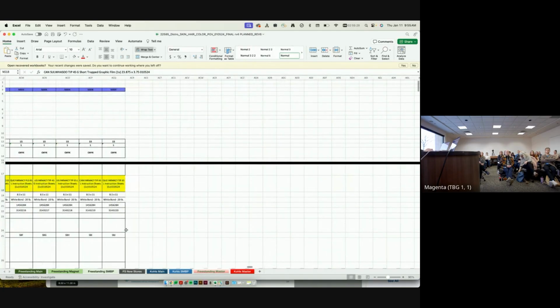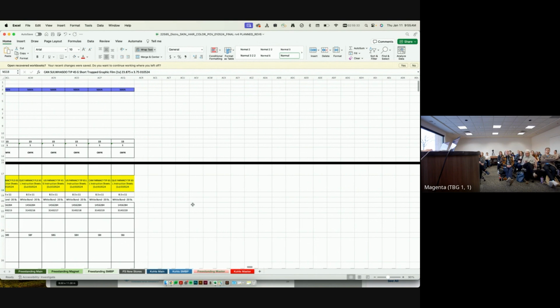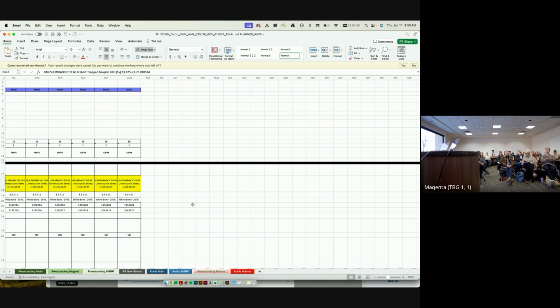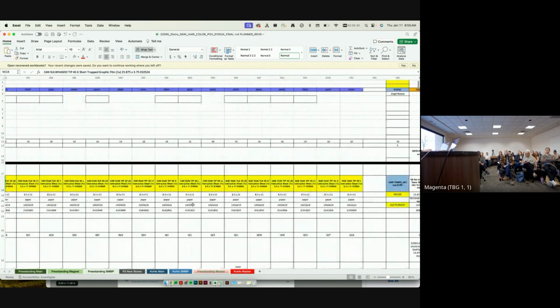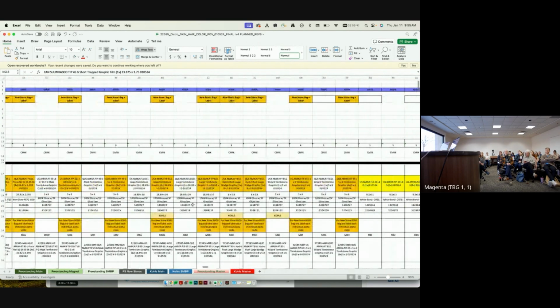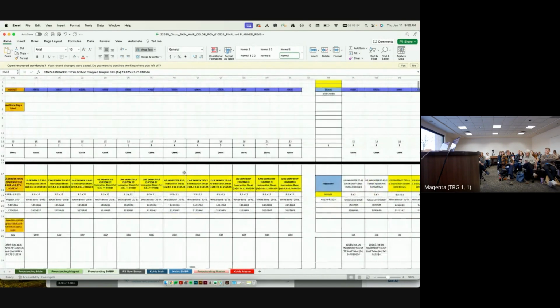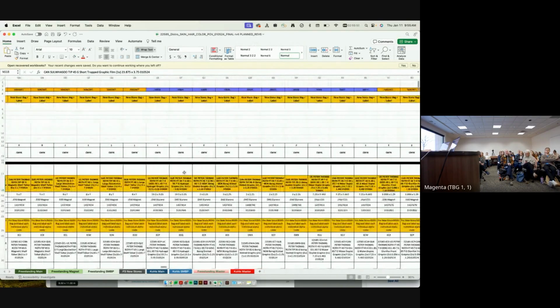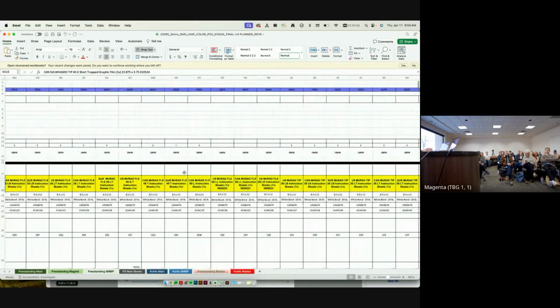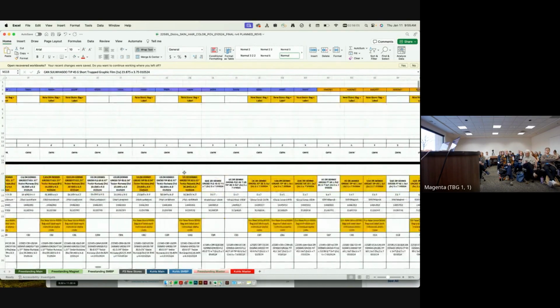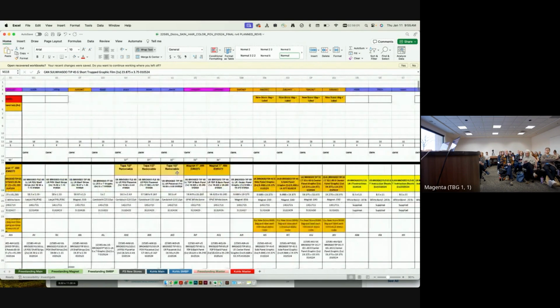Okay, so I know we've just got a few minutes left, so I'm not going to go through how we upload a print distro for estimating, but the lead time on a typical, just single brand print and kit estimate is 1 business day. If we can give our estimating partners more time to do them, we will. Oftentimes, we're not able to, but that is typical. I know when we were doing bigger projects like Bright Lights, they needed a week to be able to turn an entire store's worth of graphics, which isn't unreasonable. But for the most part, the standard that has been given to us by estimating is 1 business day.